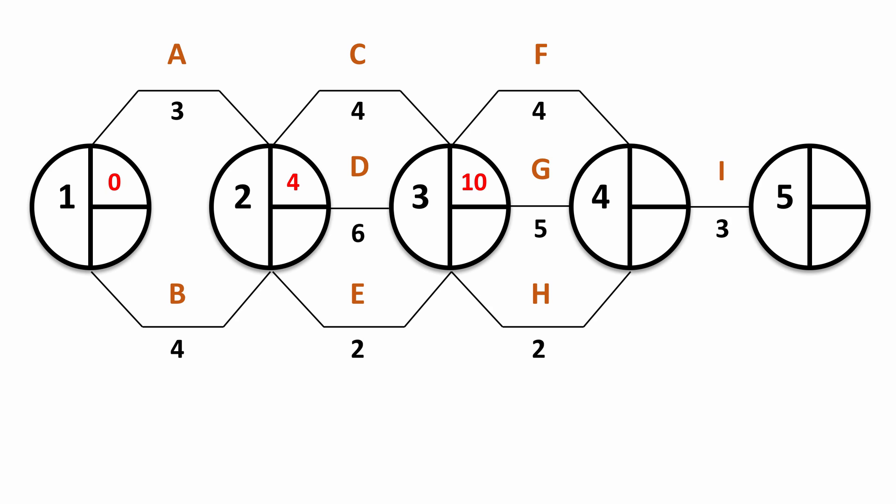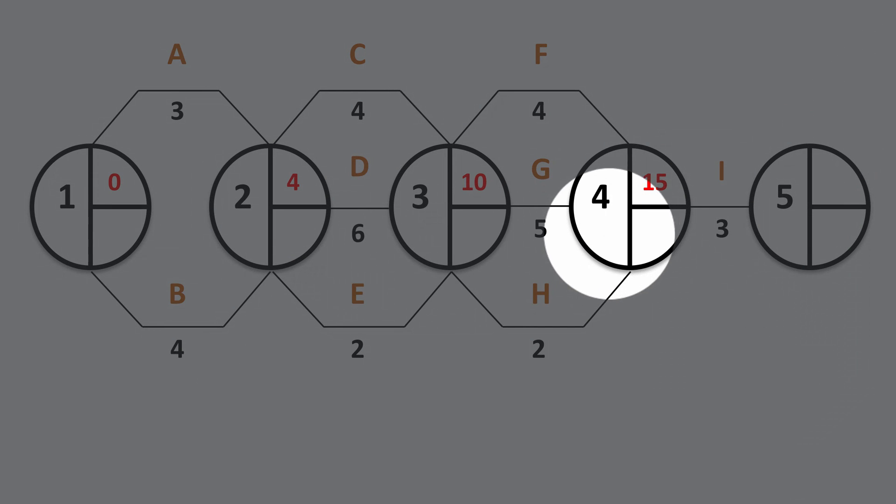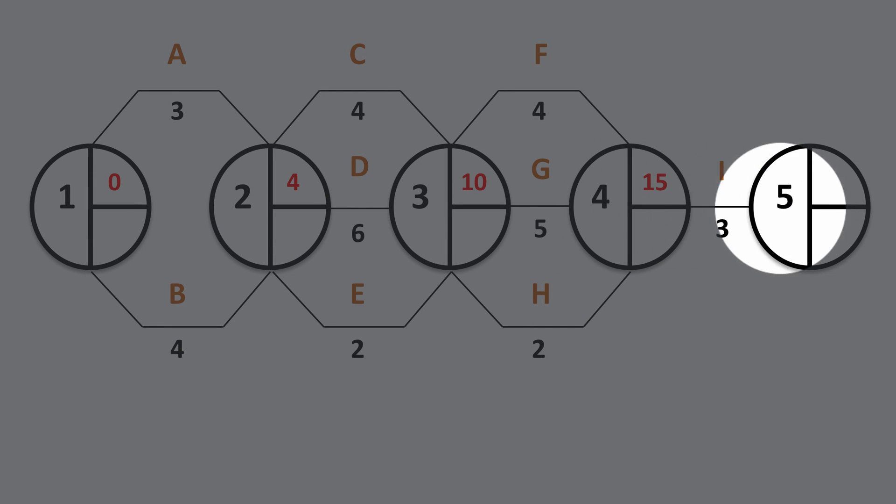There are no other activities apart from I that go from node 4, therefore it's simply a question of going from node 4 to node 5 and adding in the duration for activity I, which must mean that the project completion time to get all nine activities completed is 18, in this case 18 weeks.